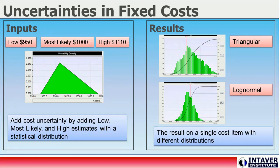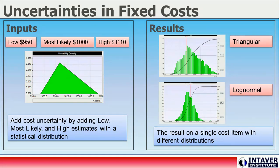Here we show how we can apply uncertainty to a fixed cost. The base, or most likely, cost is $1,000. The low, or optimistic, value is $950, and the high, or pessimistic, value is $1,100. A visual representation of these estimates with a triangular statistical distribution is shown on the left. On the right, we can see the results of an analysis using two different types of statistical distributions. Different distributions can affect statistical measures like standard deviation. The triangular distribution has fatter tails, meaning results have a higher probability of landing farther from the most likely value than in the log-normal distribution.